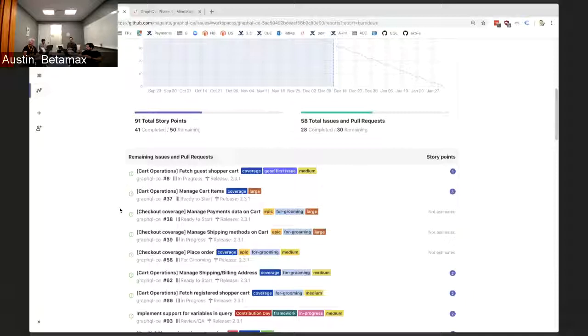But normally, the way to think about it is just relative size compared to other stories. So a story that's marked as a 3 should be about 3 times as complex to tackle as a story that's marked as a 1. And I think likely with time, right now we've got a mixture of things. We've got the size labels and we've got the estimates.